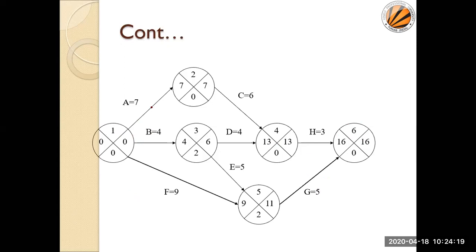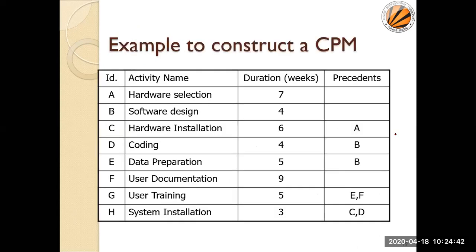But here definitely if I start the arrow, that should start from a certain node. So that's why this is not an assumed one. These start from there only. As you have seen in the same problem in AON, we are assuming start and end. Okay, sir. There must be one start, there must be one end. That is the convention of this network.